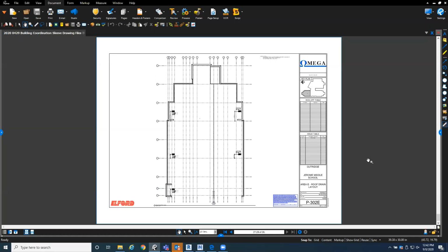We saw that on one project here in Columbus, where it was a prefab, tilt-up stud wall. It somewhat worked, but same thing, where we asked ahead, hey, can you tell us where individual studs will be? And they said, somewhat, but we can't tell you the guys are really going to put the right wall in the right place, and you probably still have to knock out some studs and move them and that kind of thing. So yeah, you've seen one. Hopefully it makes its way here, but I haven't really seen one yet.